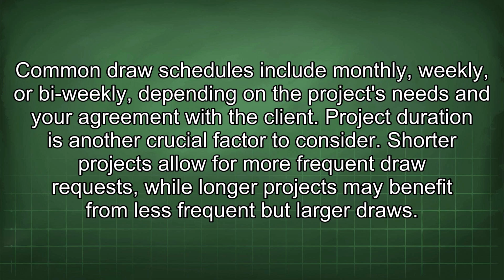Project duration is another crucial factor to consider. Shorter projects allow for more frequent draw requests, while longer projects may benefit from less frequent but larger draws.